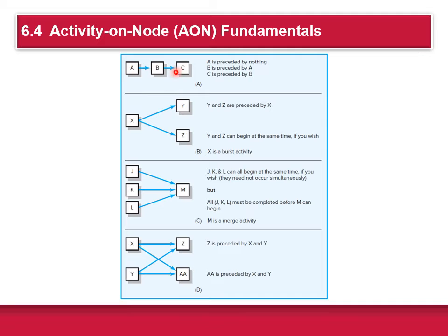These relationships, typically you start with a word description and then you form the graphical flow chart so everybody can read. So you have to keep track of what are called predecessor activities: what activities have to be completed before a certain activity.